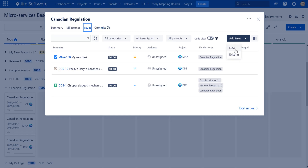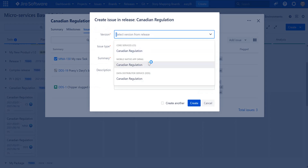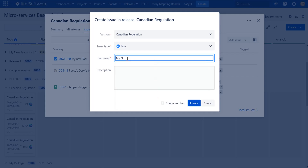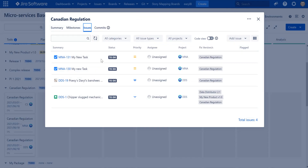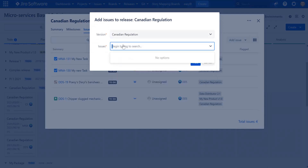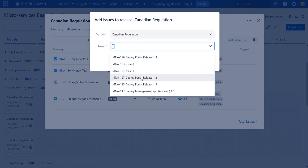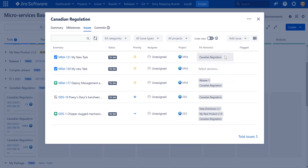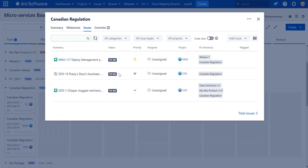I can also manage the scope of a version or release from the Issues tab. For example, I can add a new task to a version in the Canadian Regulation release — create it and it appears immediately. I can also edit existing items by choosing the version and searching for items to edit. The same approach applies for removing items — if I want to remove items from my release, I can do it from the Issues menu and after refresh they will disappear.